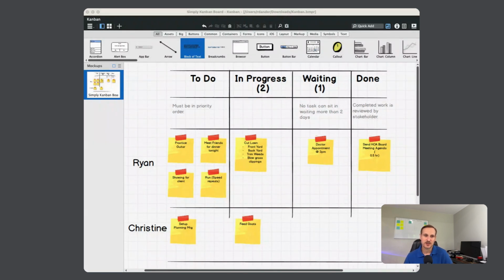In part 3, we talked about managing flow, and that was more geared around making your Kanban more efficient, looking for bottlenecks, and then measuring what we call cycle time, which is the time between starting a task or work item and when it's complete. And then looking at ways to improve the overall efficiency and cycle time, as well as using that cycle time as a guideline for completion times. So you can start doing estimates and predictions off of the workflow items once you start measuring cycle time. So we talked about that in part 3, and now we're moving on to part 4.